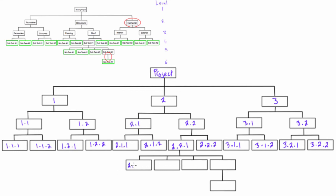So we have 2.2.1, and this would be .1, so 2.2.1.1. This one would be 2.2.1.2, this one would be 2.2.1.3. We're just incrementing that last digit, but everything else stays the same depending on which element it came from. And here we get 2.2.1.4.